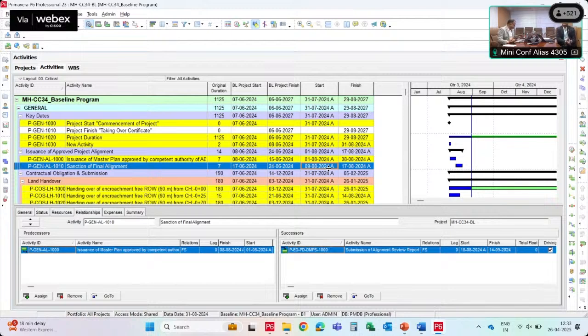So sir, basically we can physically, after saving the baseline and depending upon our cutoff date, go to each activity and update its progress on the day of review. However, if we feel that everything has progressed the way we planned, we can auto update it, and we can see in the Gantt chart also that the part till our cutoff date has now turned blue, balance is still green. The program is understanding that what was supposed to happen during this period has actually happened. Hence, the word actualize comes in and is depicted by a symbol A in the start and finish column.